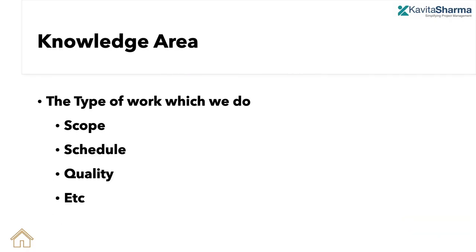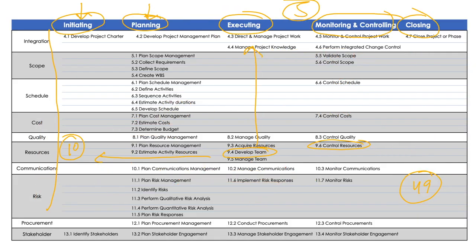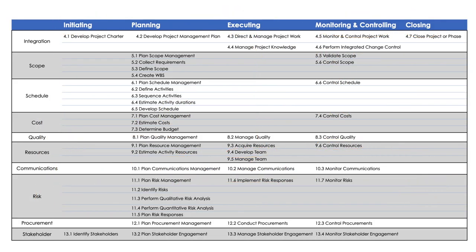Now let's talk about knowledge areas. Scope management is anything to do with scope — how do I collect requirements, what do I deliver, how do I deliver, and who signs off on the deliverables? Schedule is about when I deliver. Based on the scope, I create a schedule, identify activities, determine their sequence, consider constraints like 'you cannot do this before a certain date,' and finally develop the schedule.